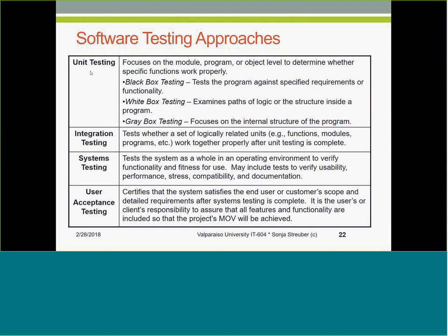Integration testing is typically performed in collaboration with the system engineer or the system administrator, because we need to take several different software modules that we have built or upgraded, connect them, and ensure that, for example, we have data flow from one through another into the last item that processes our data, things like that, right? So integration testing leads us into systems testing.